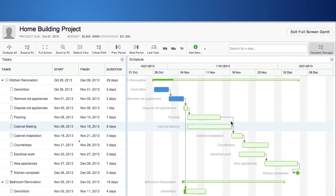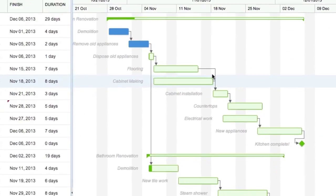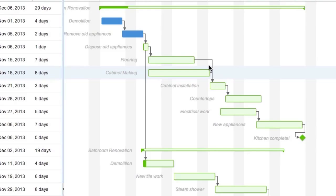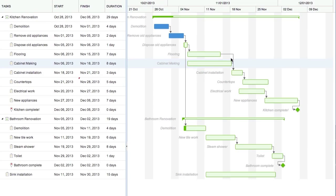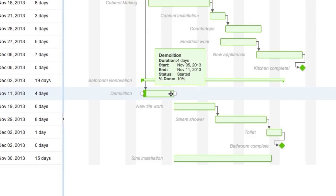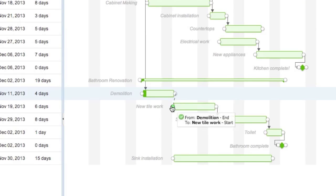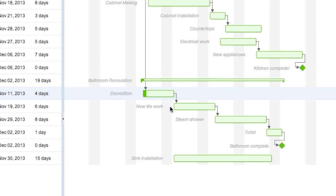By defining a task's relationship to another task, you can quickly understand the optimum workflow and maximize your team's productivity. Set dependency relationships between tasks such as start to start and finish to start by clicking the end of a taskbar and connecting the dotted line to your desired task.